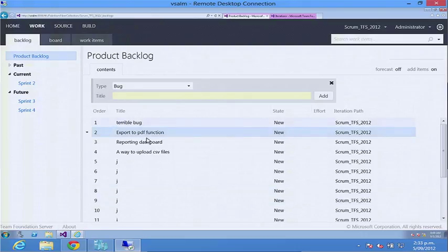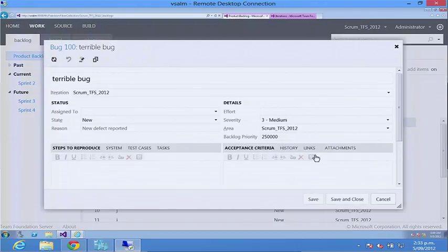And then I load up my bug. And it too has effort. Right, again, the same way to do the estimation. So underlying, this will also follow the same states as a product backlog item. So approved is the next state, then it'll go to committed. So it's a very long way of saying, yes, you could, but be aware that they do share an awful lot as types.